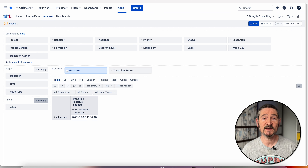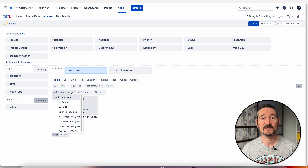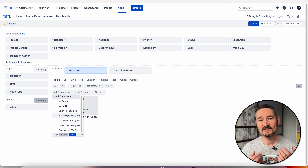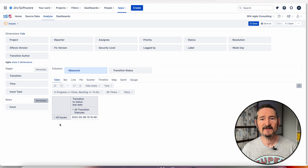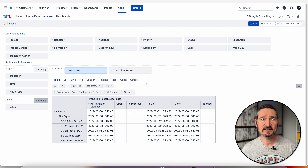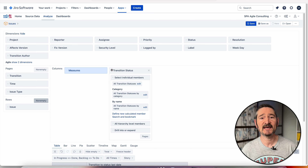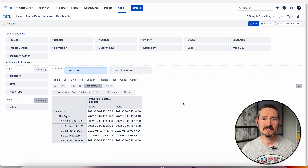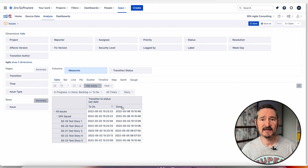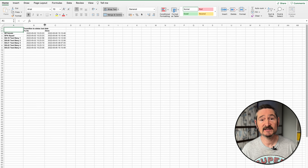Now filter by Story under the All Issues Type drop-down, and then filter by the transitions you want to see under the All Transitions drop-down. I only want to see the dates when Stories went into To Do and when they went into Done, as these are the two statuses I want to use for Cycle Time and ultimately Monte Carlo Simulation. Then expand the page to see the results. Under Transition Status in the Columns section, deselect All Transition Status and in the Hide Empty drop-down select Rows and Columns. And there you have it — the same data that Timing Status got us, but in a more complicated way. Select the little arrow and choose Excel to download the data. We'll open this in Excel and see the data ready to do our cycle time analysis on it.